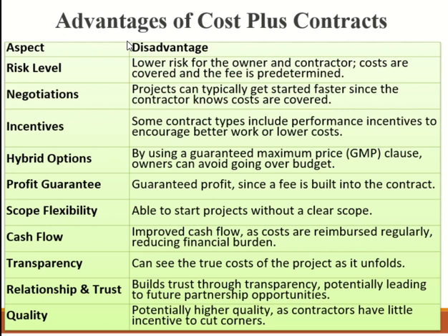We said that cash flow is better. Cash flow means when the bill will be given, when the billed amount will be given to the contractor. So it is totally based upon how much cost he is putting into the project. And that's the main issue with construction projects. The main issue is not the profit. Profit will come in the end. That's normal with anything. When any transaction, any trade you do, the profit will come in the end, right? The main problem with construction projects is the cash flow for the expenses of the project.